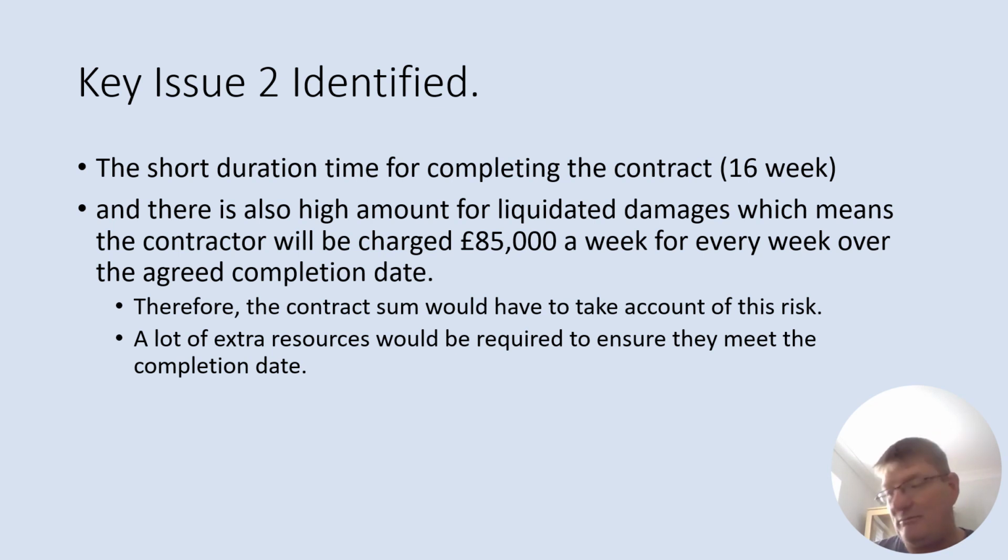You'd have to be careful on that because of the completion date. So one of the mitigations with that is the fact that you are an experienced contractor with regards to this type of work, and you understand the market in that locality because you're based in that locality. So one could argue that you should be able to complete that within 16 weeks, no problem at all. You should have the experience and the staff and the employees that are used to doing that type of quick turnover, fast track construction, if you like.